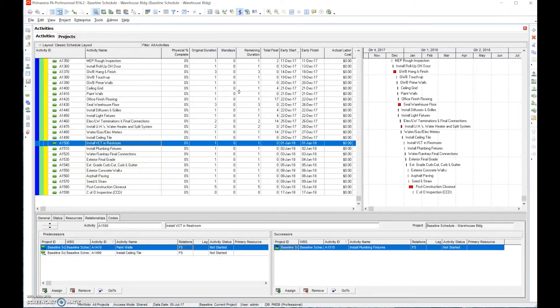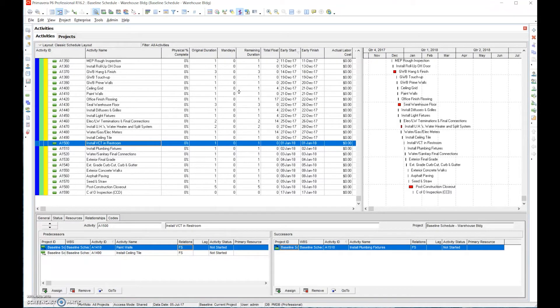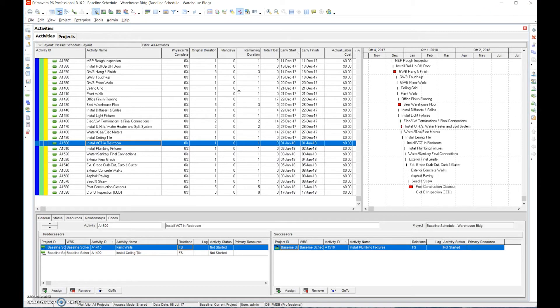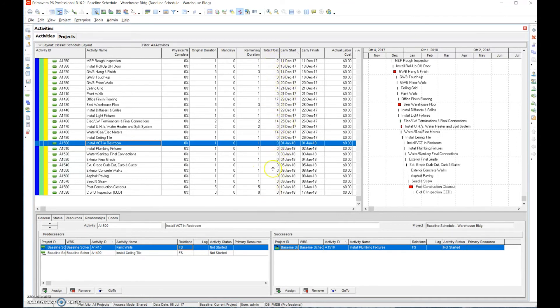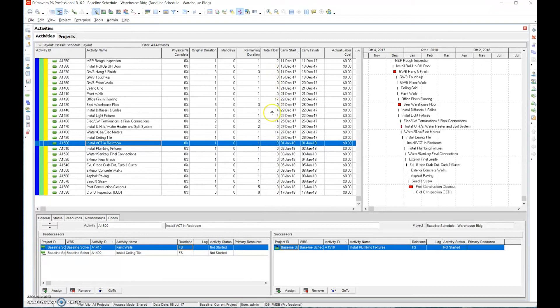We only want to put one successor in every activity. And the reason we're doing that is we want to prevent redundancies. We want to ask ourself what happens immediately after this task. Remember we talked about not having an open network, which means we have multiple different activities that don't have a predecessor or successor. We want to have a closed network where only the first activity and the last activity do not have a predecessor or do not have a successor. Float does not matter. Float information does not matter. It doesn't make any sense unless you have a closed network. If you don't have a closed network, then all these numbers don't mean anything.